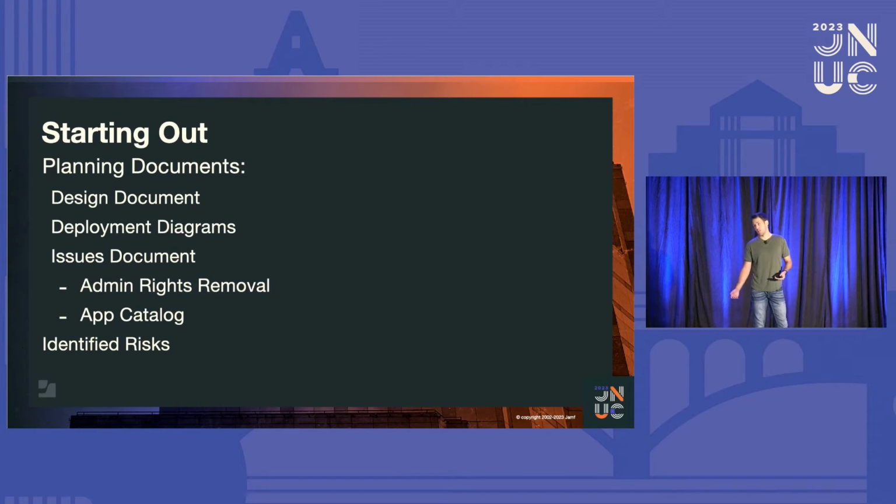The other thing that's going to be factoring in here for our risk is shadow IT. We're taking away admin rights. Guess what happens when you take away admin rights? There's a lot of mission-critical apps that were not procured during the current process, and they all need to be installed right away. So you're going to find out a lot about shadow IT really quickly.